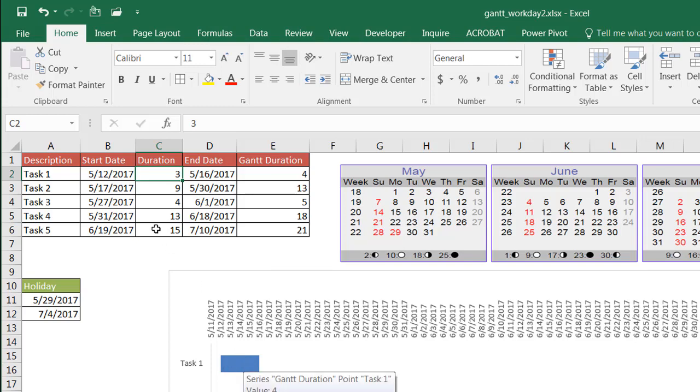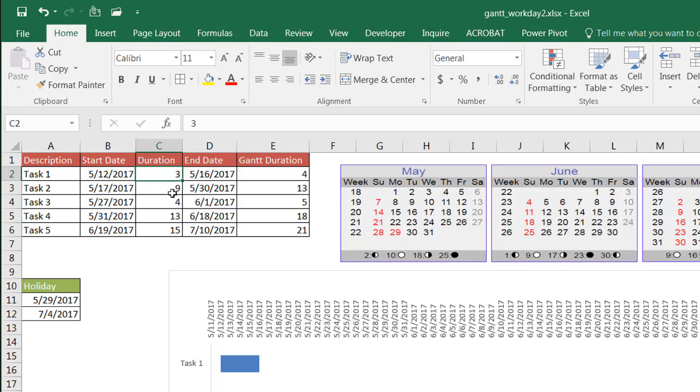This is going to be a calendar date respective to a U.S. holiday, so there's a U.S. holiday on May 29th. We can see here that for 5/17, if we had a duration of nine days and we count: 17, 1, 2, 3, 4, 5, 6, 7, 8, 9, we're not going to count the 29th. So we're going to count the 30th. So at the end date, it counts that as 5/30, so it's going to end it there.